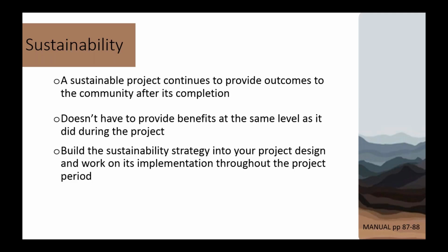Say you're in the cultural preservation department of your tribe and you have the curriculum for the language. And so it's no longer seen as maybe like a whole project, writing and developing this curriculum. And then once the project has ended, it's just going to be routine to use that curriculum for the services or classes that you provide. You're going to allow your schools to use the curriculum, and ANA wants to see that the curriculum is going to be used for many years after the project has ended. So that's what we mean by institutionalization.